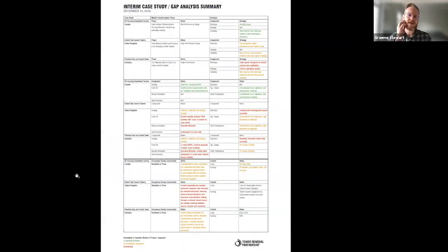And what we found, and if you look at the report, we developed this traffic light system, which is red, yellow, and green. The green were things that are readily available in our marketplace, and often what we use in Ken Soble. We use some of the yellows in Ken Soble as well, which were more difficult. You had to import it. There were issues around trade readiness. Was there a novelty factor that was priced in? And red were things we just simply couldn't get, things that just weren't available, weren't warranted, and weren't CSA approved.